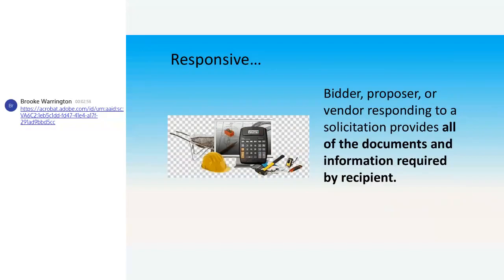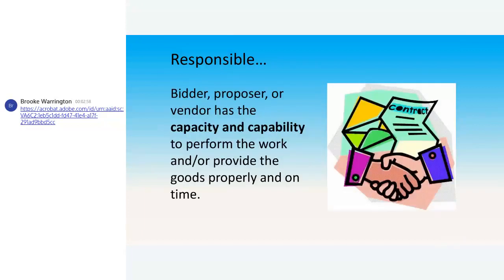Responsive: a bidder, proposer, or vendor responding to a solicitation that provides all of the documents and the information required by you as the recipient. Responsible: a bidder, proposer, or vendor that has the capacity and capability to perform the work and provide the goods properly and on time. This is an area where you will make that determination.